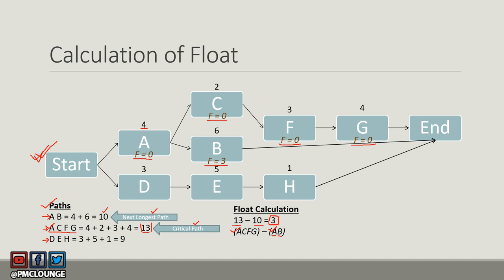Float for activity B is 3. Although activity A appears on this path, it is a critical path activity, so its float remains zero and cannot be changed even though the calculation gives 3. Activity B's float is 3, meaning activity B can be delayed by three days without impacting the project end date.